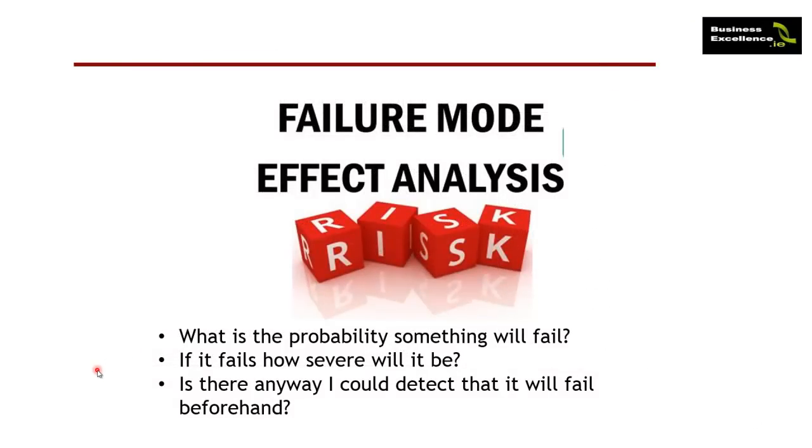At any stage during the process, if you've come up with a new solution, it may be very important to look at what are the potential failure modes for this solution. So for example, if you look at any process, where could the process go wrong? And if it does go wrong, how serious would it be? And is there any way I would detect it beforehand? This is a process called failure mode effect analysis, and it's the study of risk.